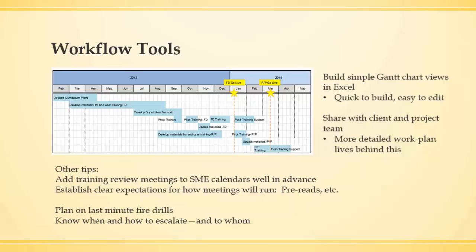Workflow tools. Rule number one about workflow tools is do not let the workflow tool dictate how you spend your time, because you need to get the work done rather than filling out project plans. I have that conversation with every project manager with whom I've ever worked when they want me to build my training plans in Microsoft Project, and that is overkill. You will spend more time managing project than you do managing work, and that's not the intent.